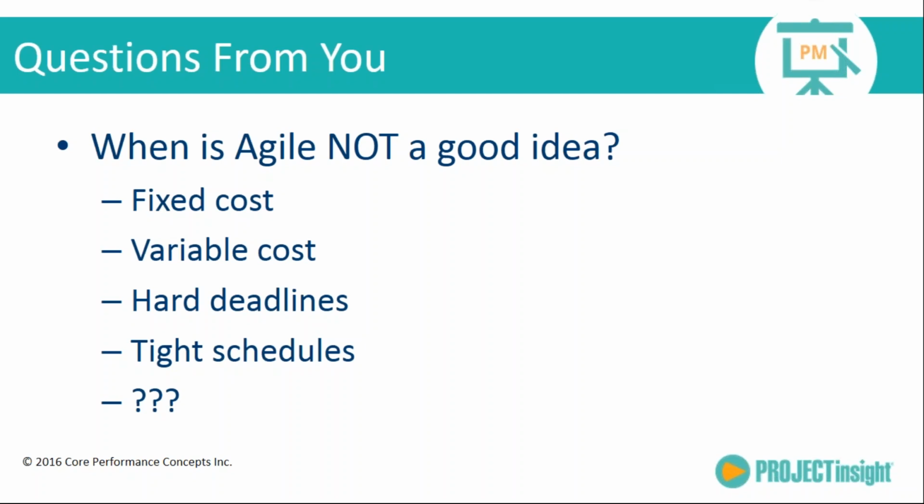So for example, some of you may work in a government kind of environment. I used to work in defense contracting, and when our organization received the contract to work on a particular project, the definition was already there. There had been weeks and months and maybe even years of discussion on putting together the specifications for that particular project. And if your project is that well defined, it's probably not necessary to use an Agile kind of environment.